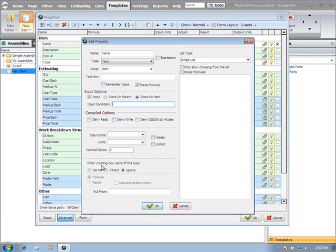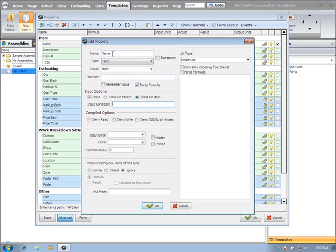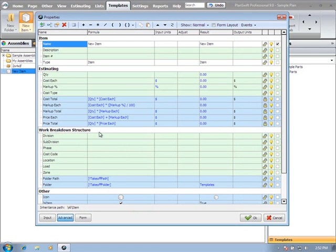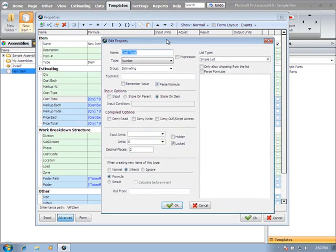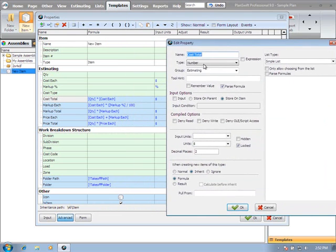When creating new items of this type, what do you want this function to do? So when you're applying this item to your job, do you want to ignore the formula, inherit the formula, or just have it be a normal formula result? That's really going to depend on what property you're editing. So in this case, this is the name property, so the choice here is going to be ignore - I just want it to use the same name that's in there. If it were a mathematical calculation, let me open up one of the other properties here, such as the cost total. You'll see this one is inheriting the formula. So when I apply this to the job, it's actually going to take this entire formula with it and populate that formula with that.